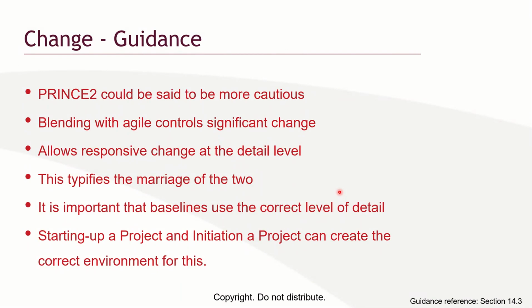Can they reinforce the foundation? Well, see, that is where it is possible. And I'll give you an instance where they do that. There are times that you will see a building, there will be pillars that are strategically located, and all the other floors will be resting on those pillars. That means you are creating indirectly another foundation around the one you had before. Do you understand? That's the only way. You have to still go back to the foundation. You have to do another foundation around the one you have so you can hold the other seven floors. So that is still going to affect the baseline.